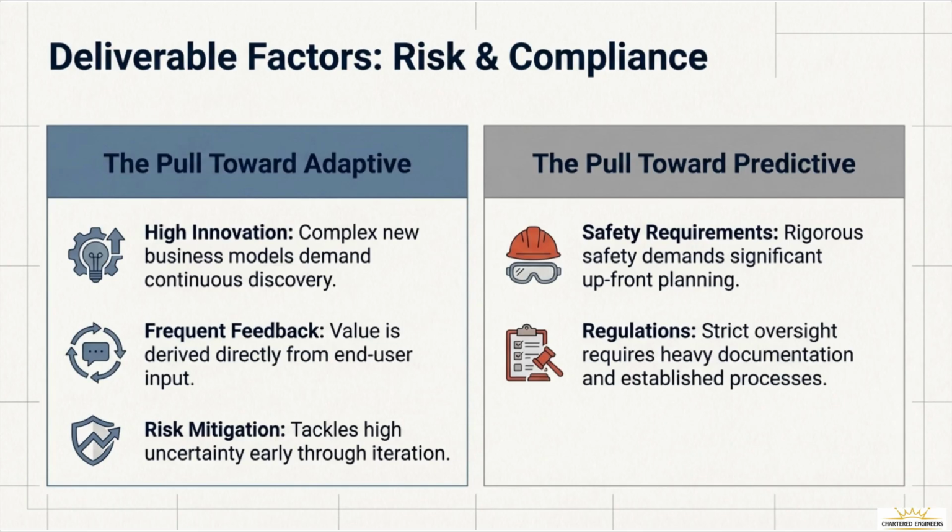This matters because as a project manager, you must balance these pulls. You might use an adaptive approach for the user interface of a medical app to get that frequent feedback, but keep the data handling backend under a strict predictive framework to meet regulatory compliance. This balancing act is the core of modern project management. Let's shift our focus now from the deliverables themselves to the execution environment.